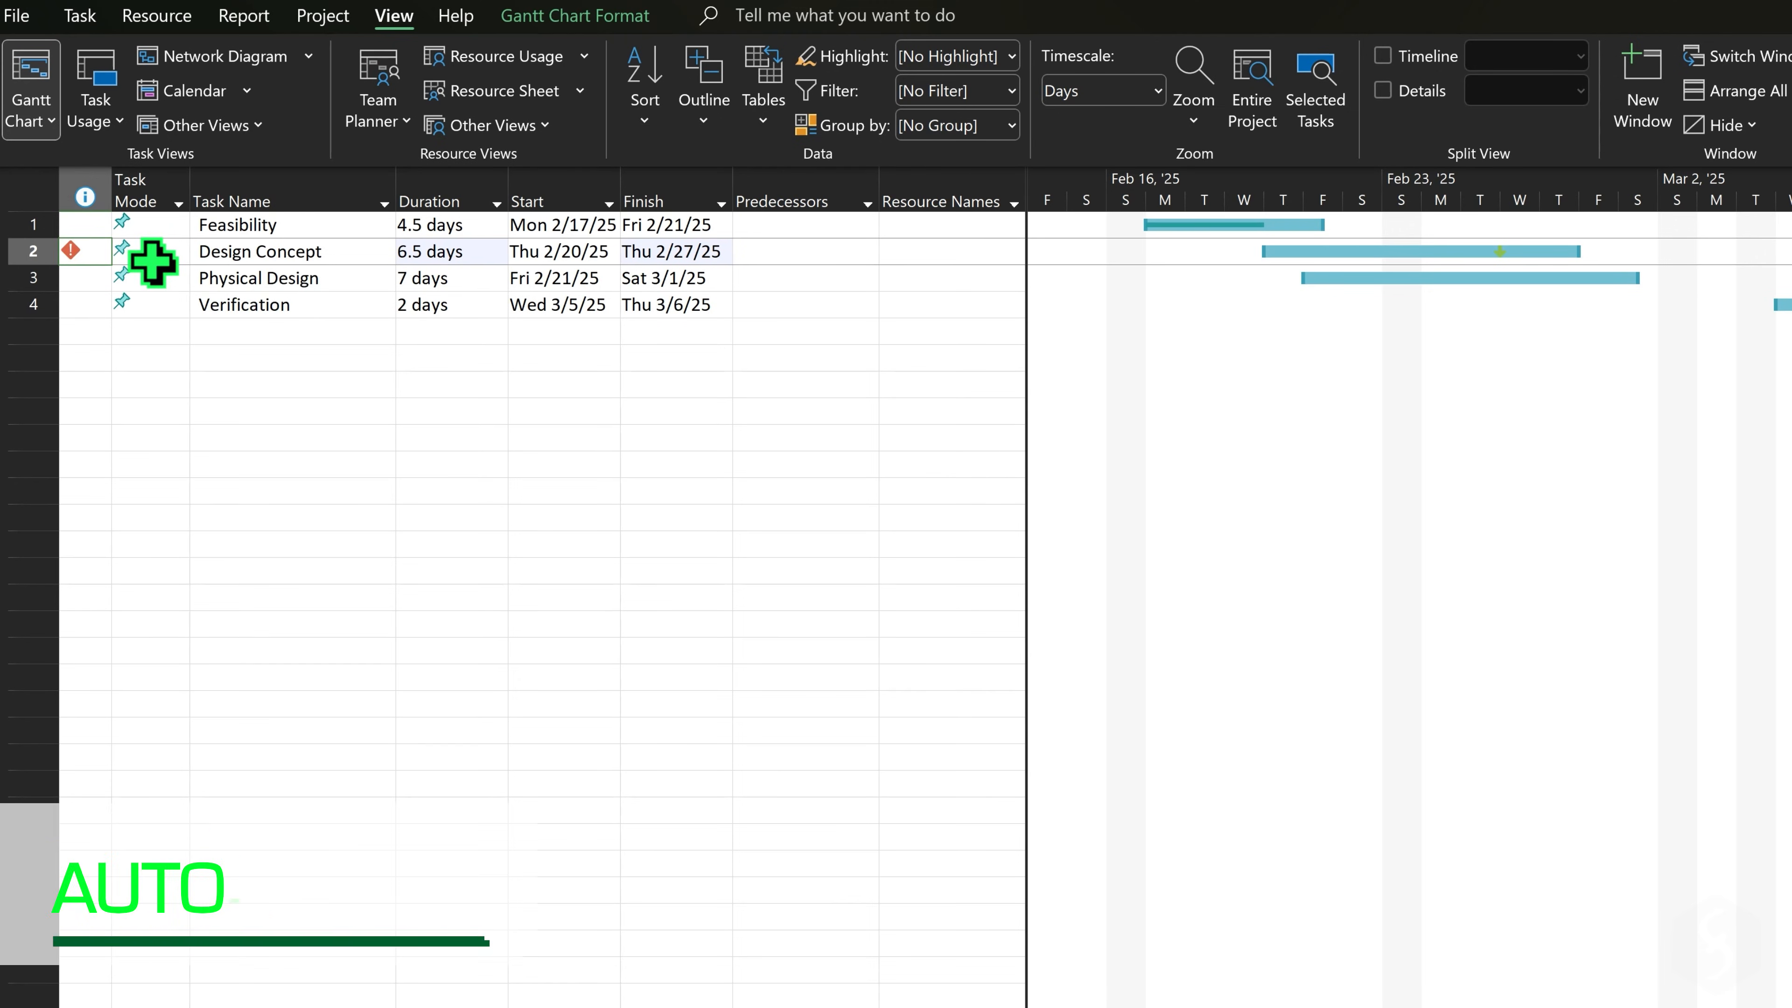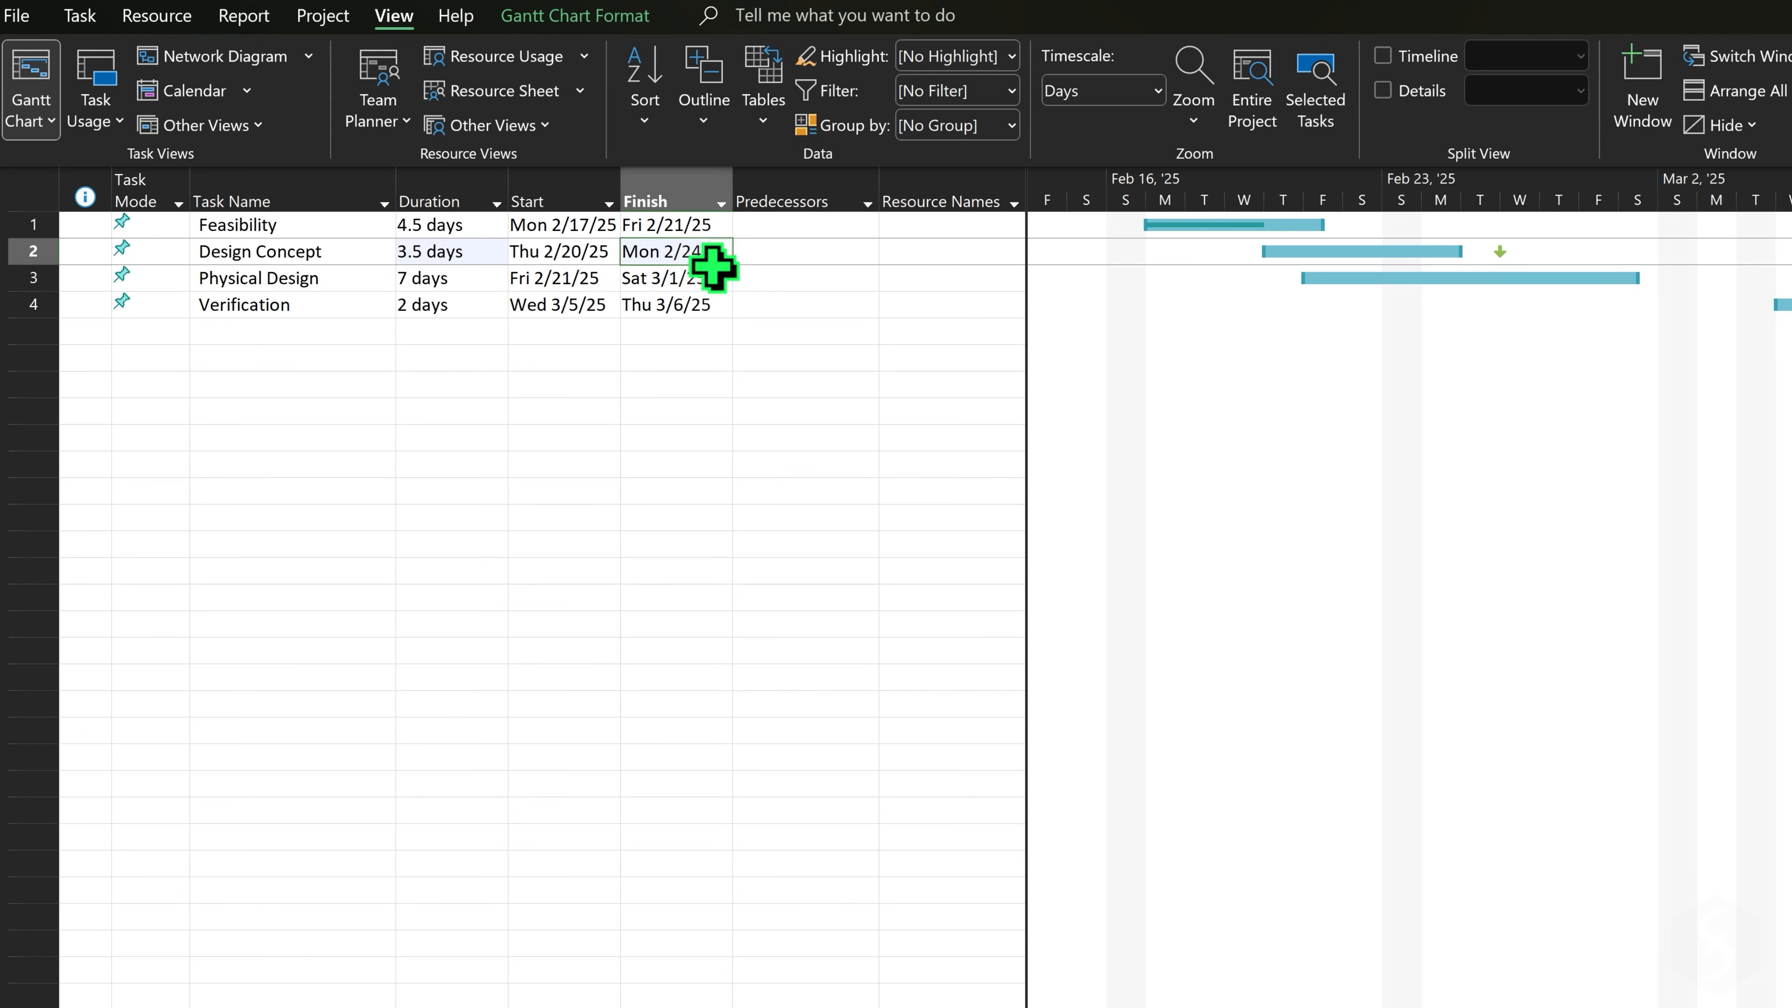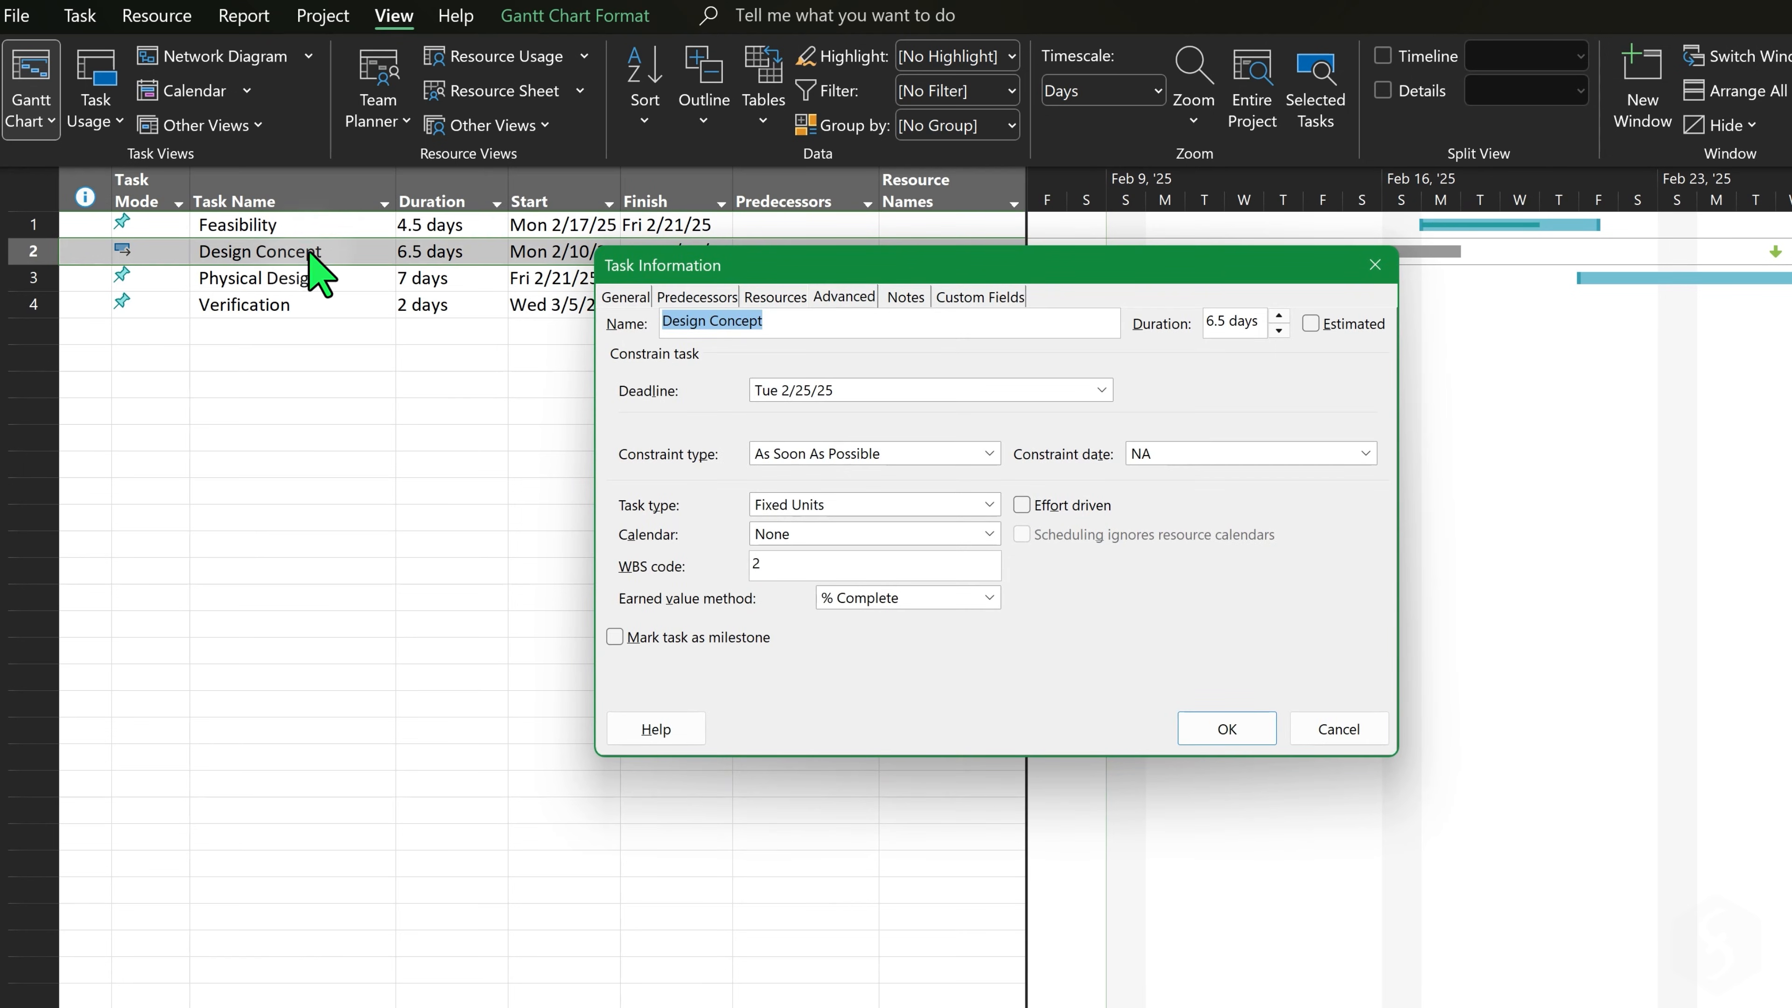By default, all tasks are manually scheduled, meaning their start and finish dates, as well as their duration, must be manually adjusted in case of conflicts. To save time, you may switch to Auto Schedule Tasks under Task Mode. These are automatically managed by project according to the constraints you set from the Task Information panel under Advanced.